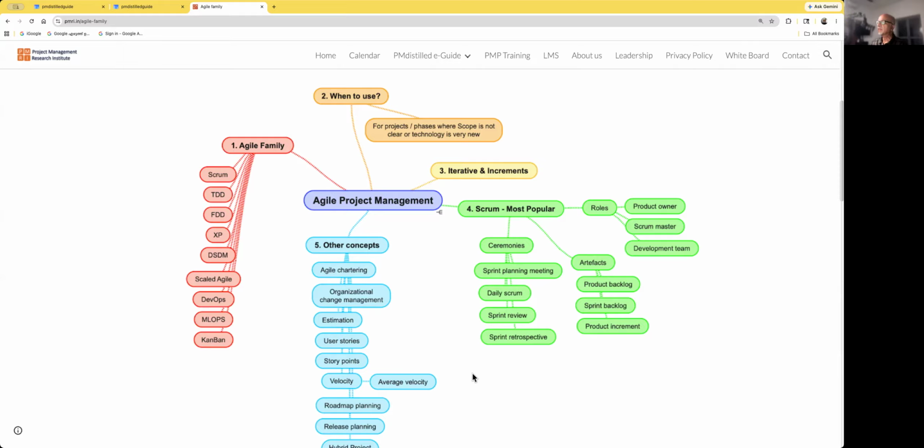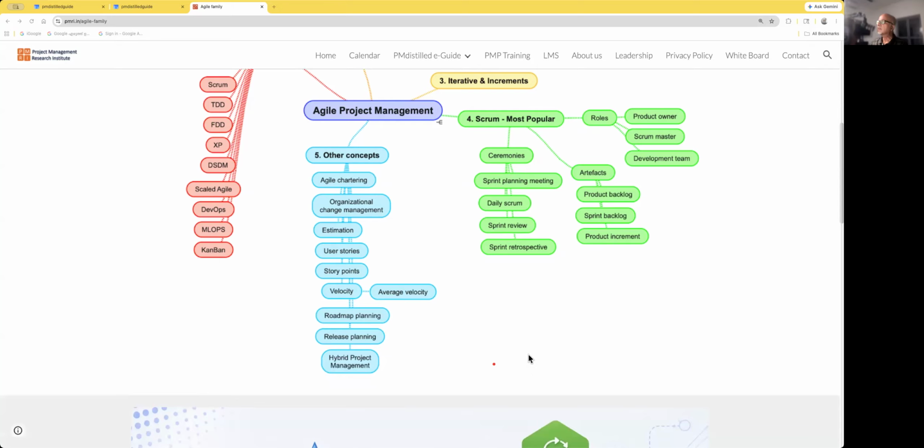When we start with agile projects, all we have is the product backlog, one-liner entries. So we need to estimate. Then we have to decide in total how many sprints, and in each sprint, how many story points we can complete. And we define the roadmap of the project from start to finish, totally how many sprints, and at the end of how many sprints we'll make a release to the client.